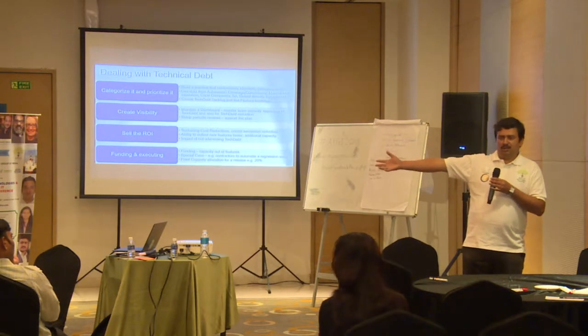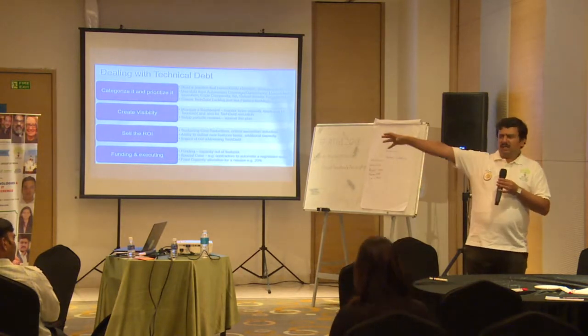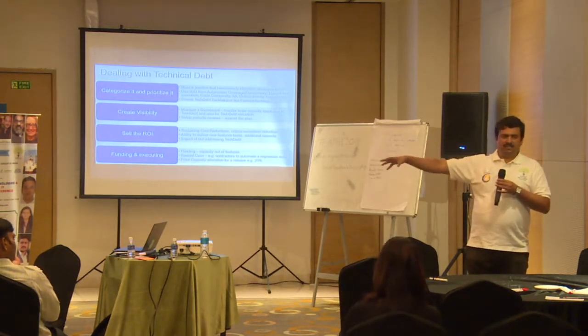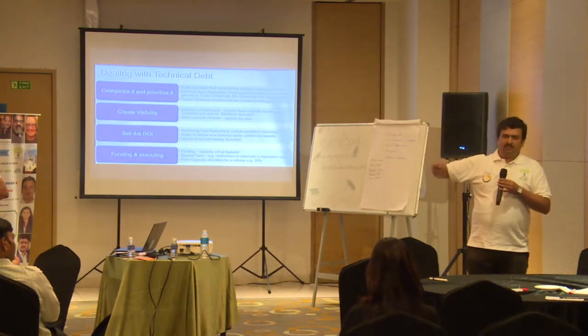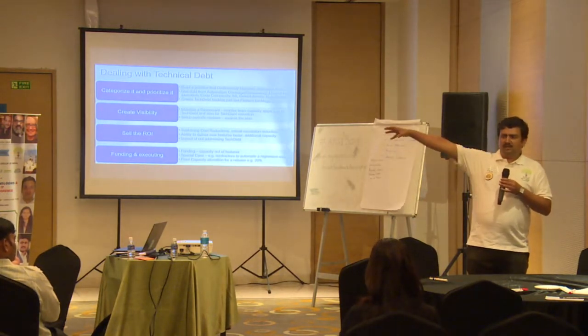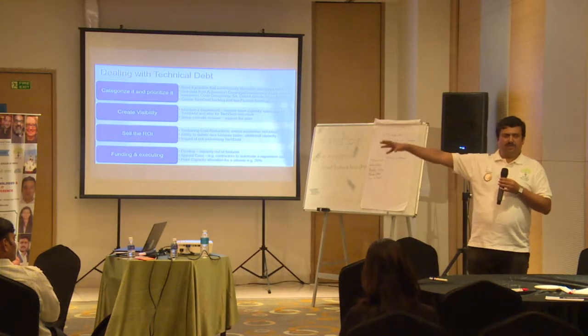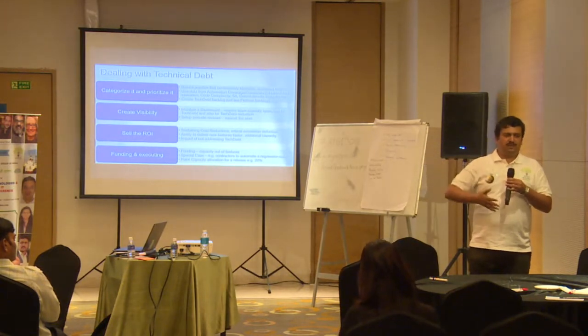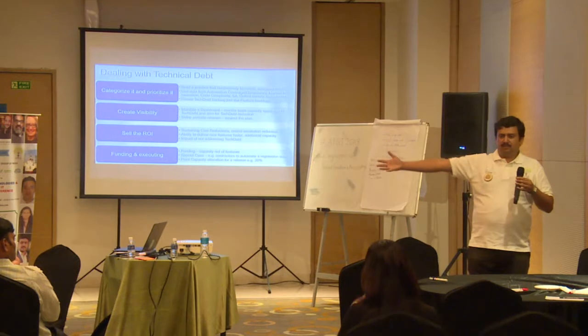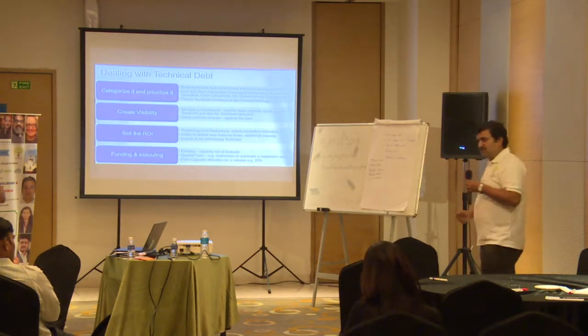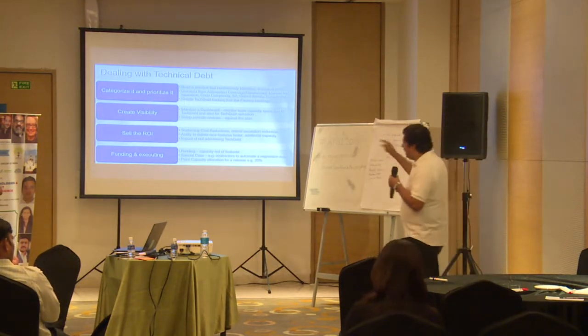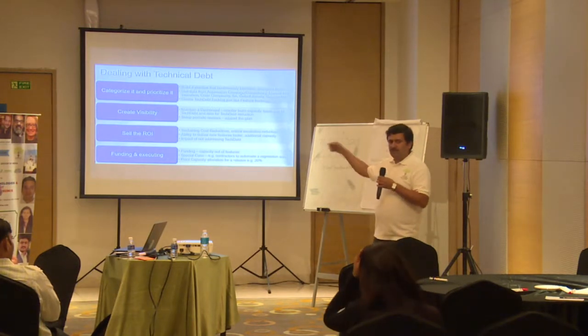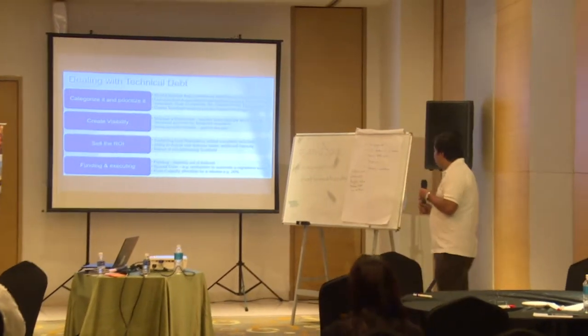We saw that in one of the product lines where we were working. There was a clear call taken by the leadership team: I know you guys are super busy, we don't want you to get into this, we'll hire a specialist testing automation team to take test automation from say 30% to 90%. Awesome, done. It requires clear investment and clear strategies, and that will happen because you are trying to sell this to the leadership.